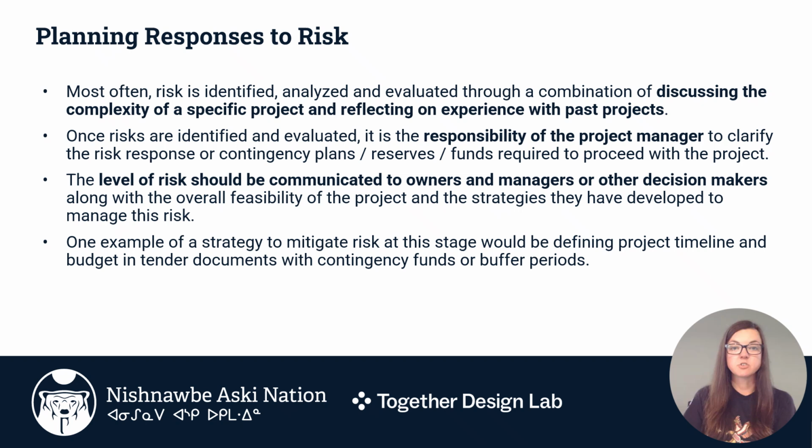One example of a strategy to mitigate risk at this stage would be defining project timelines and budgets in tender documents with contingency funds or buffer periods.